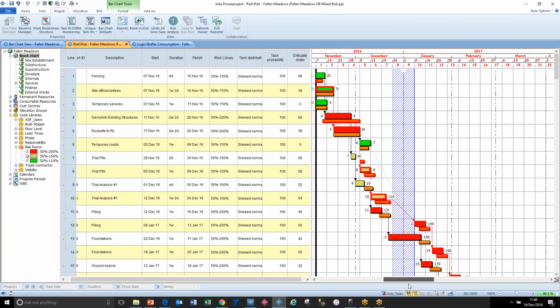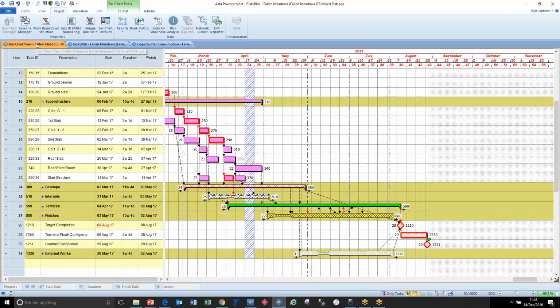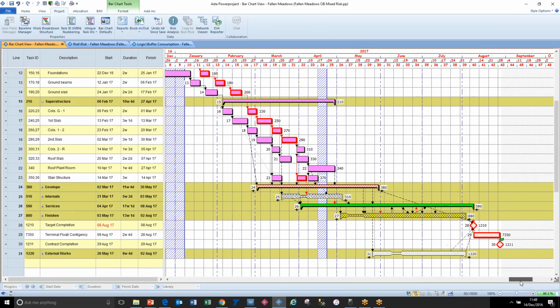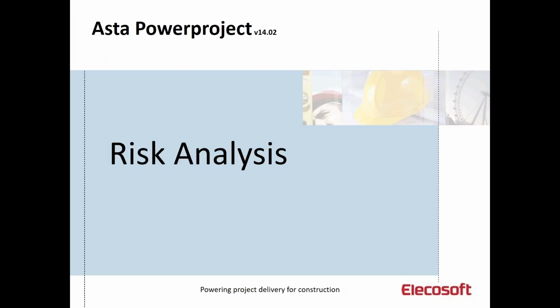If the project were to change, or after you bid and won, then you could still resimulate at the 75 or the 90 percentile that you went in at, and you'd have a way of re-estimating what your risk profile was going to be. But it's quite subjective and perhaps difficult to convince people, but it is a tool that is valued and used in the industry. So that's the information I wanted to show you about the risk analysis.